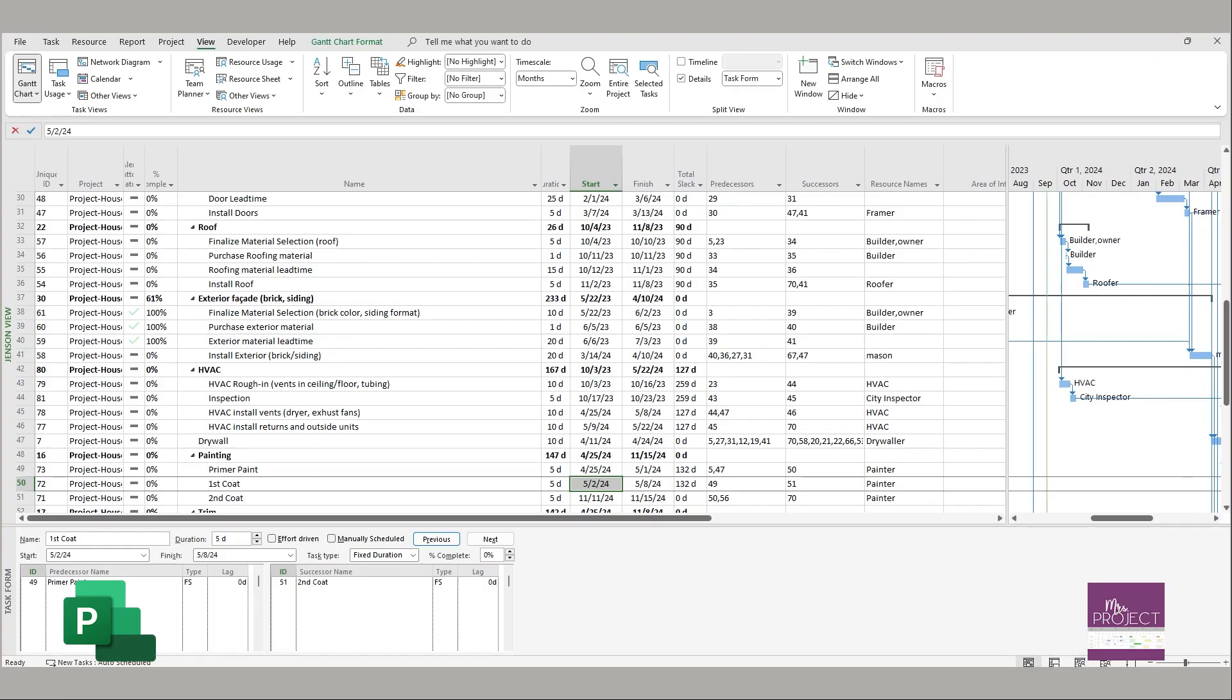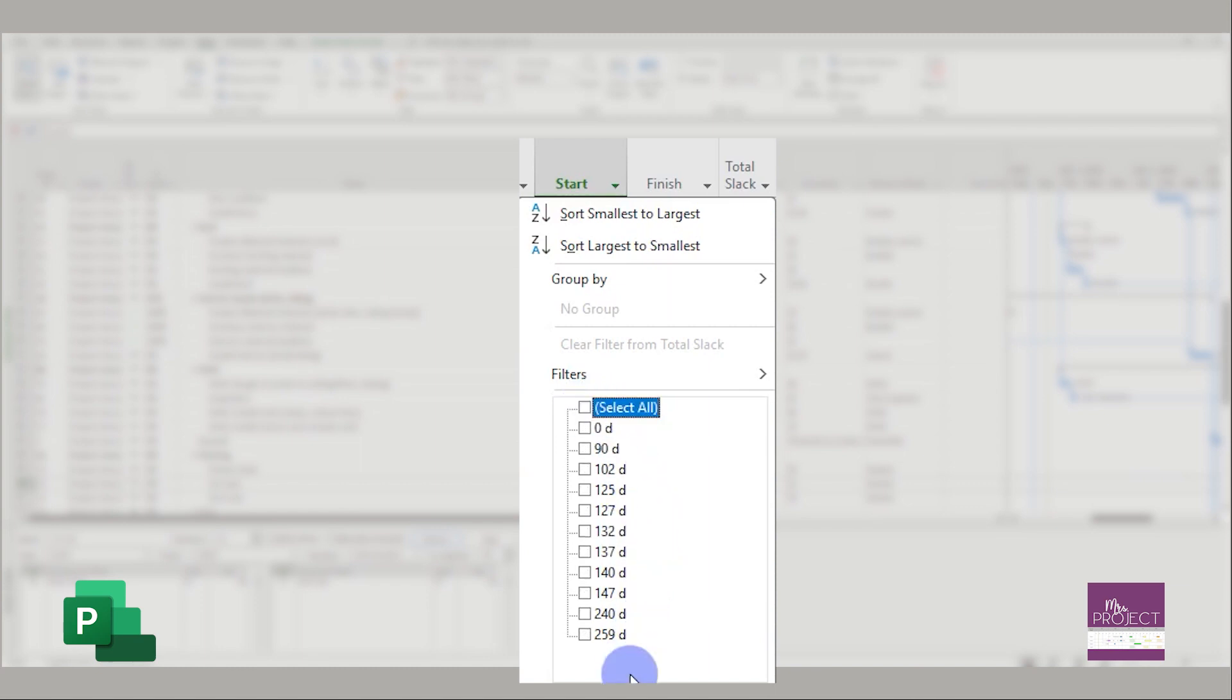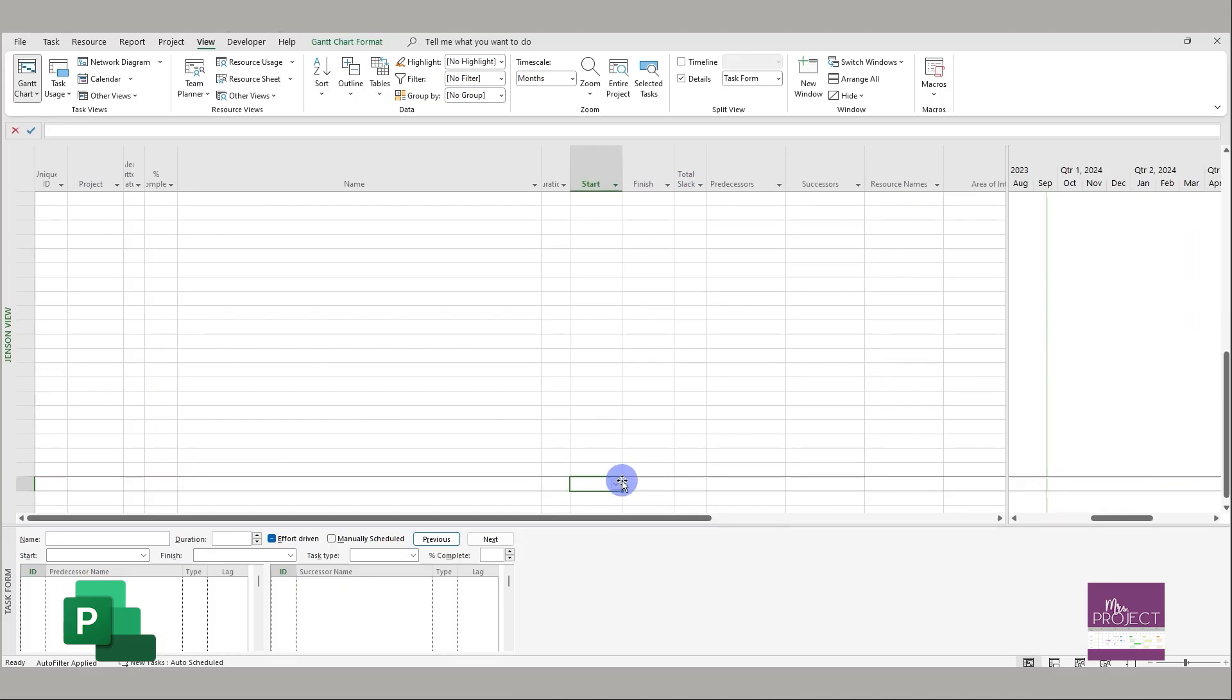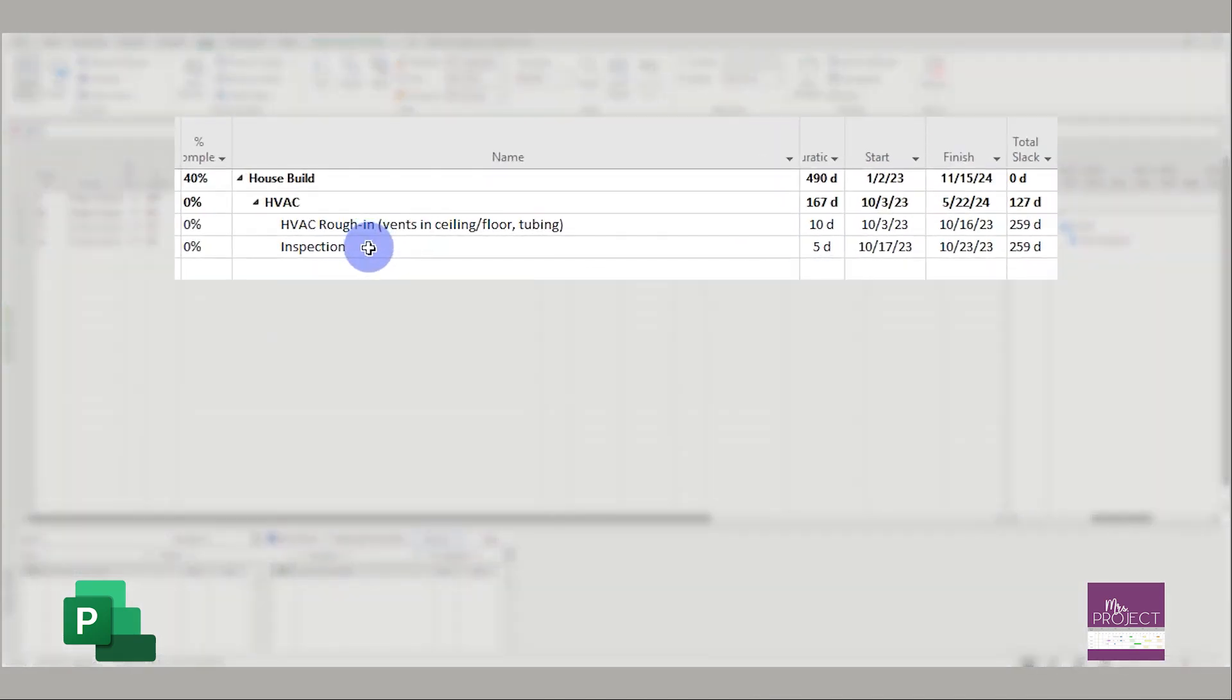This metric is looking at your total slack column. You want your slack to be below two months, and if it's not, you just need to look at the relationships. So in this instance I have nothing that has less than 44 days of slack, so everything would be tripping on this metric. But what it is: I'm gonna pick the highest one and click that and say, okay, it's HVAC. It's saying that I have 259 days of slack before it's needed.